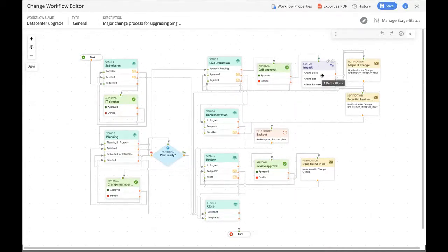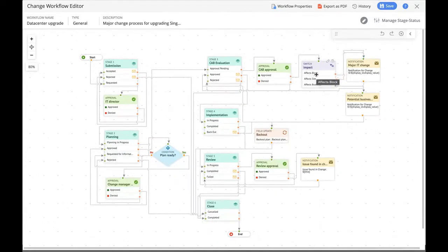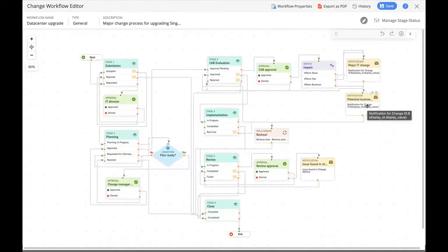Zilker has mapped two paths: if the change affects a block or a site, a set of notifications is sent to certain executives. If it affects the business, a potential business downtime notification is sent to the chief executive officers. From here, the change heads to the implementation stage. Once implementation is completed successfully, it heads to the penultimate stage — post-implementation review — which has another approval process and notification linked to it. Once post-implementation review is completed, it heads to the close stage.